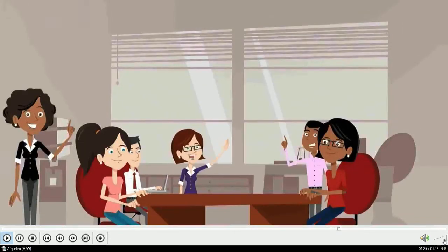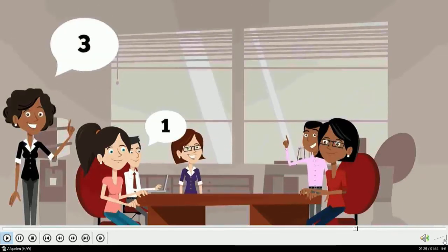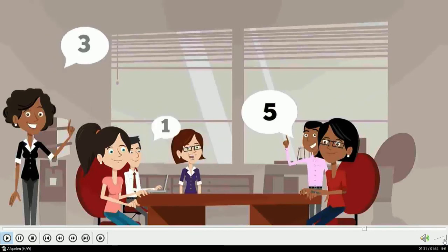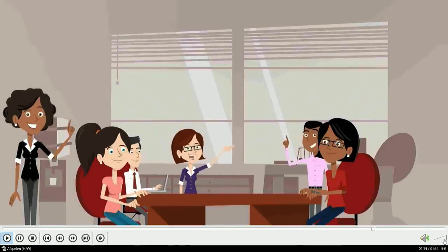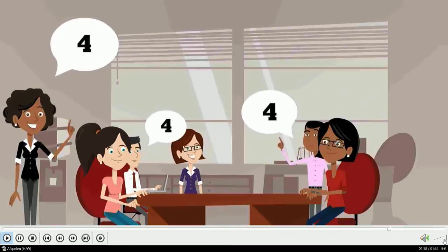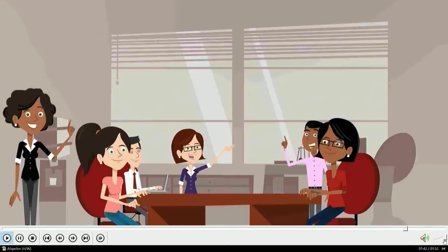During the meeting, participants will discuss and argue why they believe certain risks deserve a particular score. This way, everyone can discuss whether or not they agree with one another. This discussion can lead to a consensus and will raise risk awareness amongst all participants. That's why we advise to discuss as many risks as possible that are not in consensus.